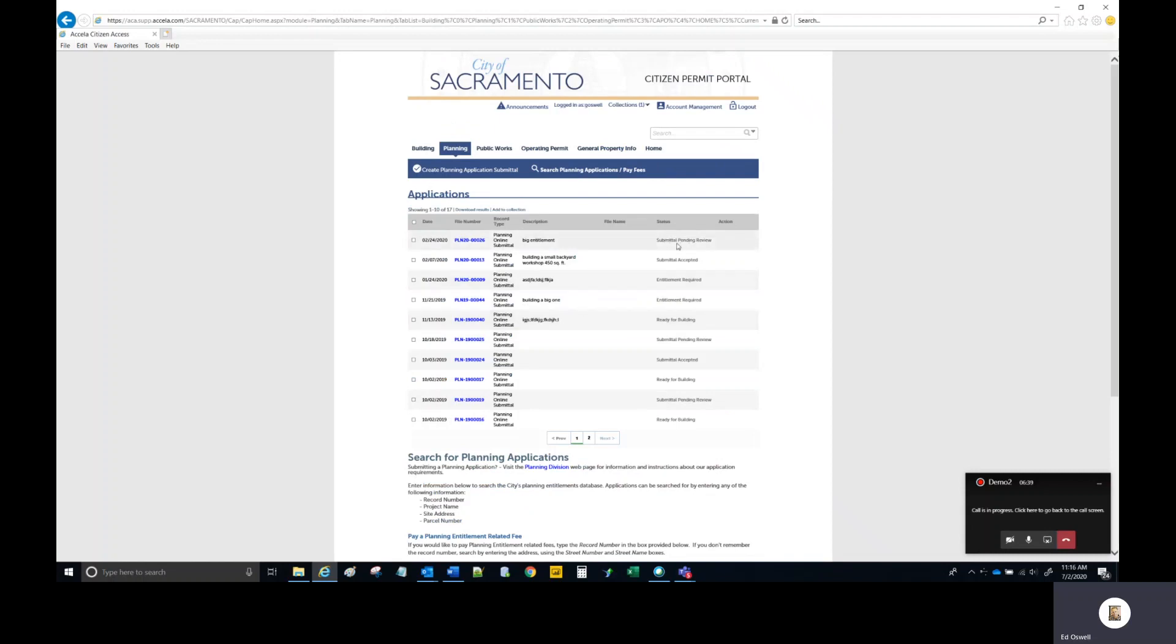This allows you to observe that the status for that record has now changed to submittal pending review. That status is the status that alerts the city that new files have been uploaded and need review. And that concludes the process.